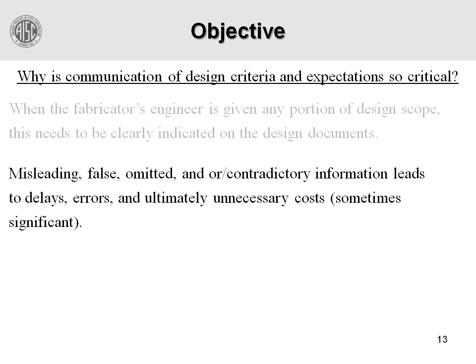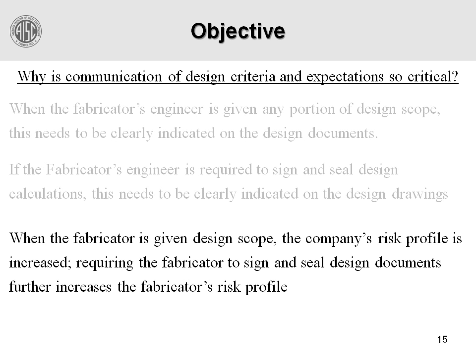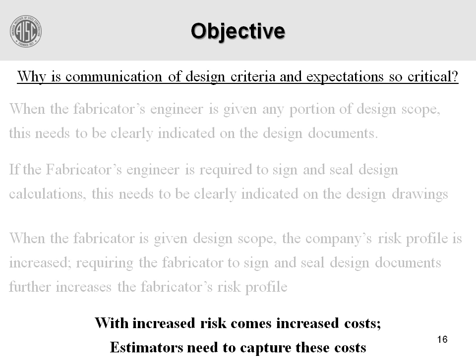Additionally, if the fabricator's engineer is required to sign and seal the work that he or she is doing, that needs to be clearly indicated on the drawings also. If the fabricator is given the design scope and needs to sign and seal that work, the company's risk profile is increased even more. That kind of information needs to be communicated so that the estimators can capture the costs related to that during the bid stage.